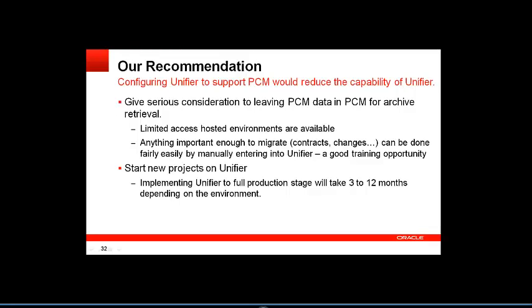What we have found in doing migration is anything that's important enough to migrate, such as contracts and changes, print them off and then manually enter them in Unifier. It's a great training opportunity. We've probably entered more data manually than we have by using technology and programming to do it. And start new projects in Unifier.